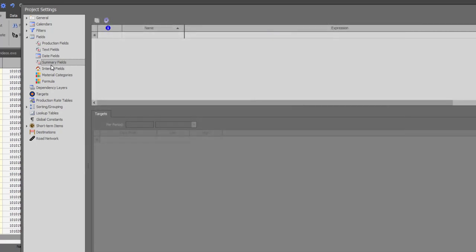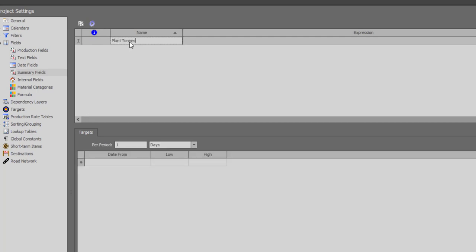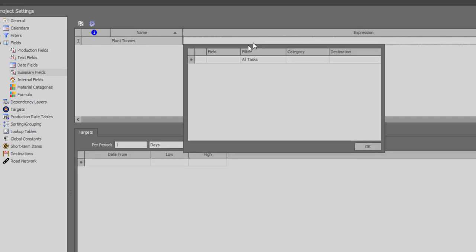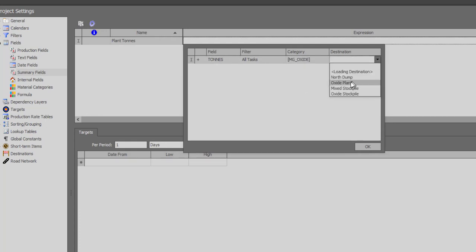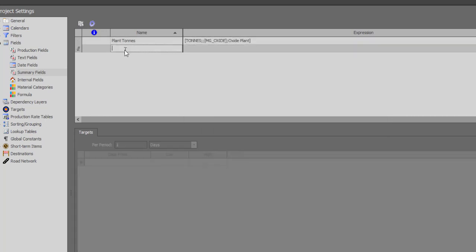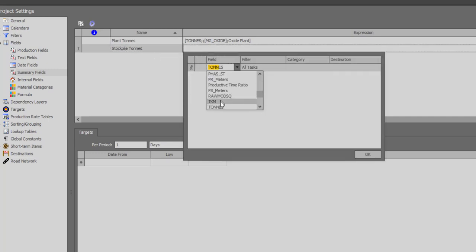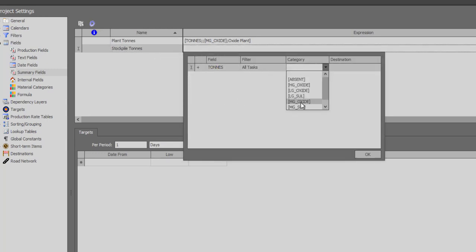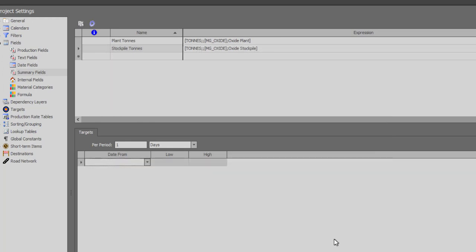We can report this by creating two summary fields, one being the plant tons for which the expression is tons of medium grade oxide that is sent to the plant and two for the stockpile tons for which the expression is tons of the medium grade oxide sent to the stockpile. These two can now be reported on the crosstab.